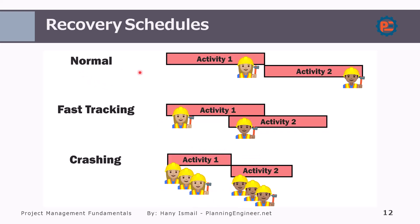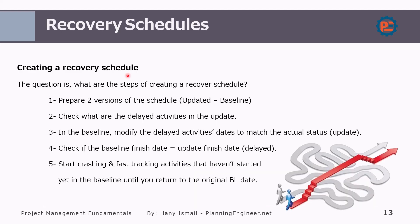In the normal scenario, we have Activity 1, then Activity 2. Fast tracking means we start Activity 2 before Activity 1 is 100% complete, to gain time — reducing the project duration. Crashing will reduce the duration of Activity 1 and Activity 2 individually to complete the project earlier.